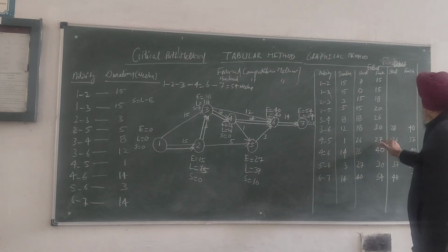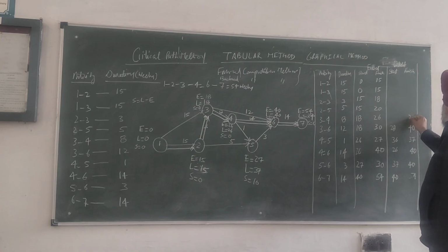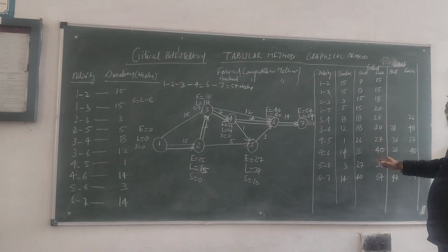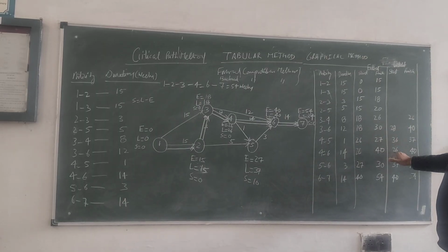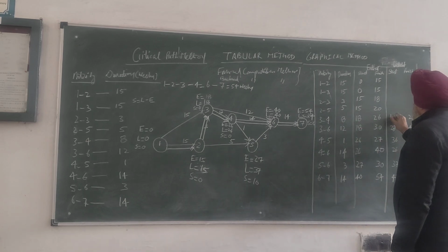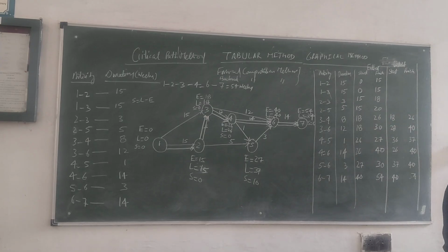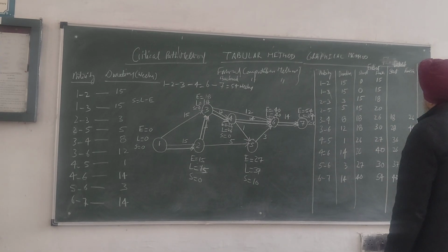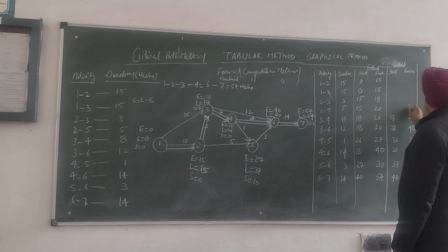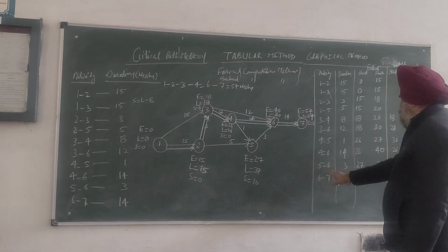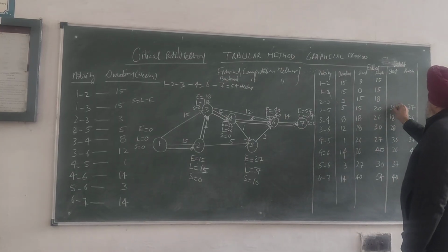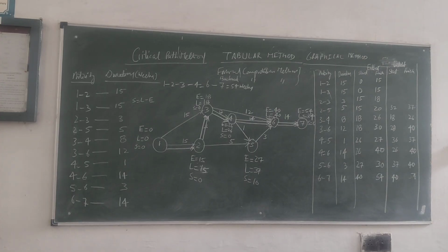At 4, this is the value you are getting. Choose the least one. In our latest start and latest finish time, we are going to choose the least one. Here we are getting two values, 36 and 26. We choose 26. 26 minus 8 is 18. The duration has to be subtracted. At 5, the value is 37. 37 minus 5 becomes 32. Okay?